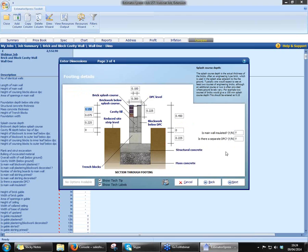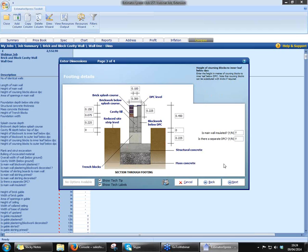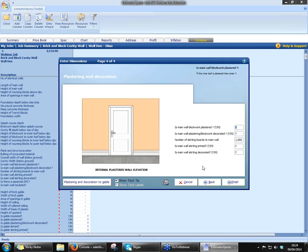Click on Next — you've got footing details, the kind of thing you guys are going to be used to costing anyway, it's just in front of you on the screen. So you would just work through these, change your dimensions from your set of plans. You've got a couple of yes/no questions — things like is the main wall insulated? Is there a separate damp-proof course? As soon as you say yes, it will automatically cost out all the labour, material, and plant associated with that job. Click on Next again — we've got some decorating work as well, just asking for finishing. Are you going to be doing the decorating, plastering, so on and so forth? Click on Finish.